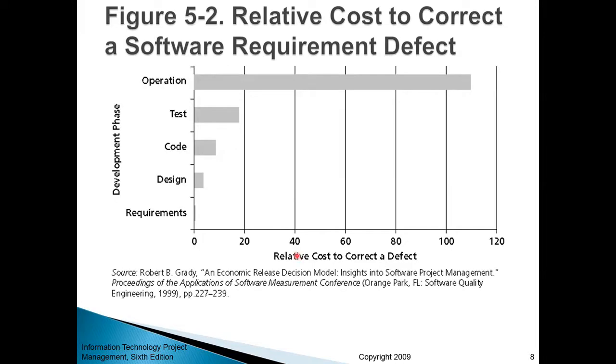And it is okay to spend more time during the requirements analysis phase or requirements collection phase. As you can see from this diagram that is based on economic research, it's very easy to change, to modify requirements during the requirements collection phase. In fact, it doesn't cost you that much. It doesn't cost you anything at all, almost, right? So it's very easy to change requirements when you're still talking about requirements, when you're still collecting them. But when your system goes live, when it goes into operation, it becomes very costly to make those changes.